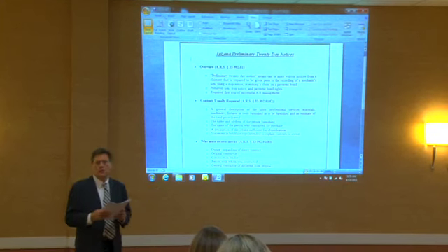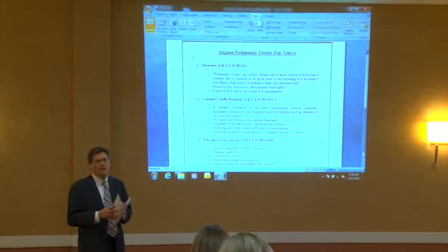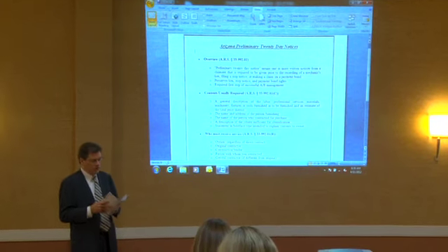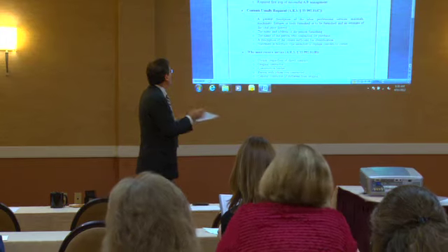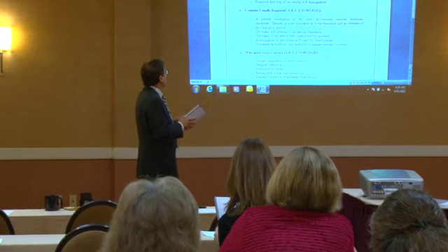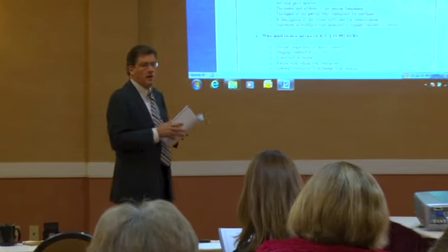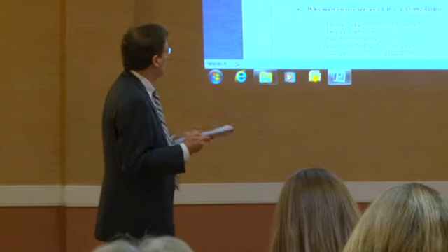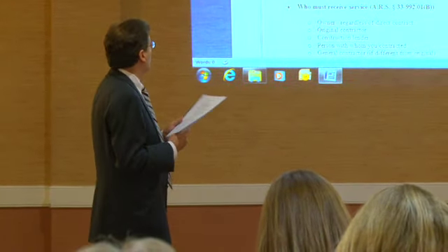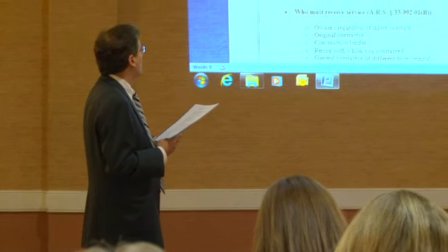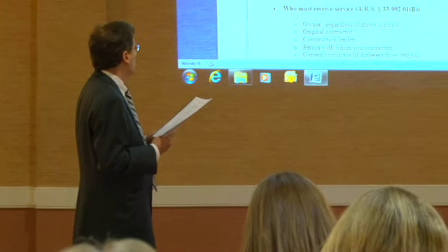They're an innocuous single sheet of paper that is mailed out to parties on a project. If on page 4 you're seeing that it's just a simple page that notifies the owner of the project and the general contractor that you are supplying materials or labor to the project. It preserves your lien rights, your stop notice, and also your payment bond rights.